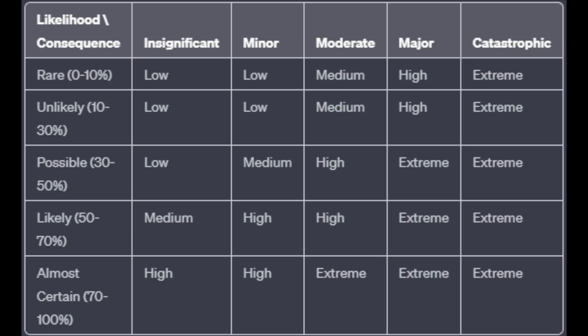So let's say that we have a team that is waiting on work to be done from an external vendor, and that vendor is unable to bring us the results we need in a certain amount of time, potentially, right? Because this is a risk, and that is something that maybe we've had experiences with this vendor being late on deliverables before. We'll definitely want to keep that in mind as we work with them again. Some projects you're kind of forced to work with certain teams, and maybe that's just something that you need to be cognizant of and document along the life of your project.